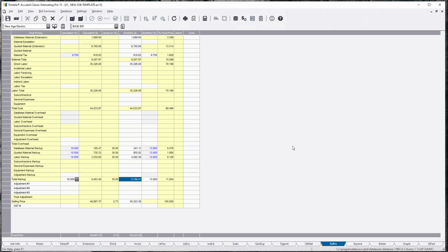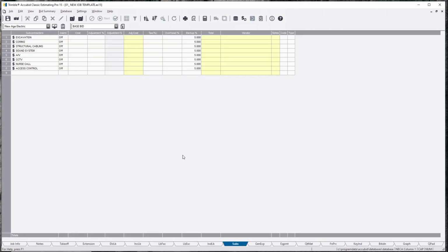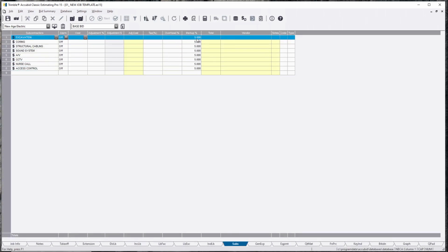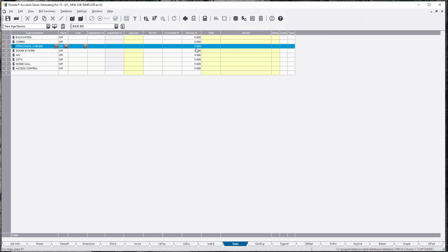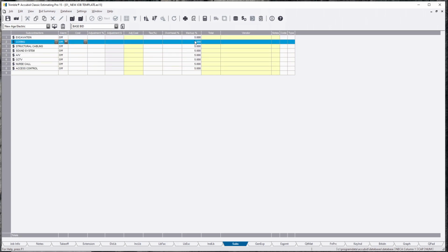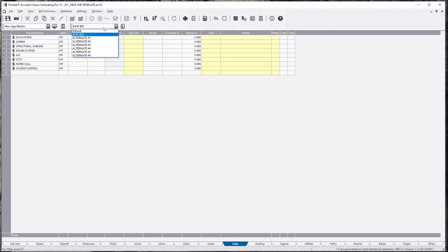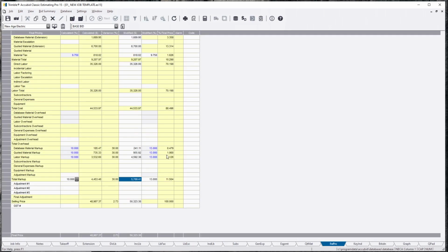Also, keep in mind, if you're doing subcontractors too, you want to make sure you're controlling how much you're giving back or you're adding to this job. Like I said in my other one, you can basically do the alternate and be safe with that and not have to worry about any of this. But if you're doing it in the base bid, remember, this is all being applied to the base bid, and your final price is adding that markup and all of this.